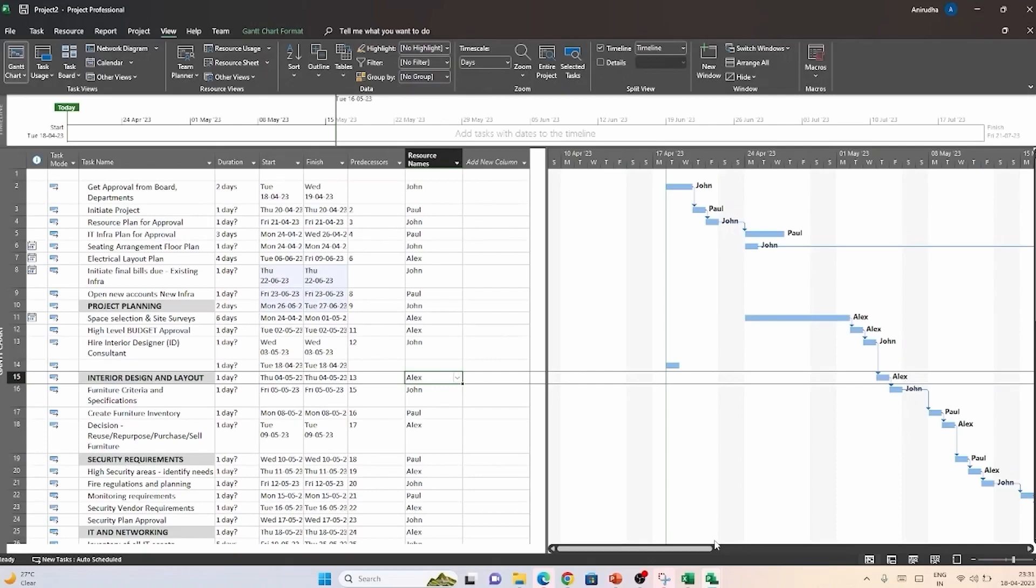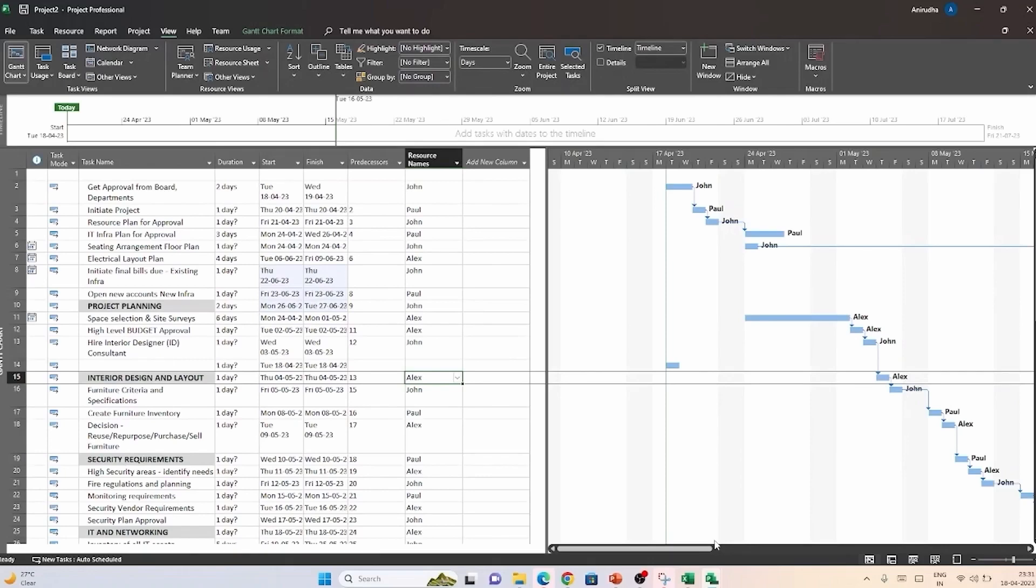Therefore, when you baseline your project after you have created the schedule, it is a snapshot of the planned schedule with no actual work tracked or recorded yet. The baseline will be very important later in the project as you compare actual data with planned data. The baseline enables you to compare what is happening with what was planned to happen according to the schedule. This is important because the work and duration fields are actually planned fields that start to change as actual work is entered. Now, in this lesson, we will learn how to create a baseline.